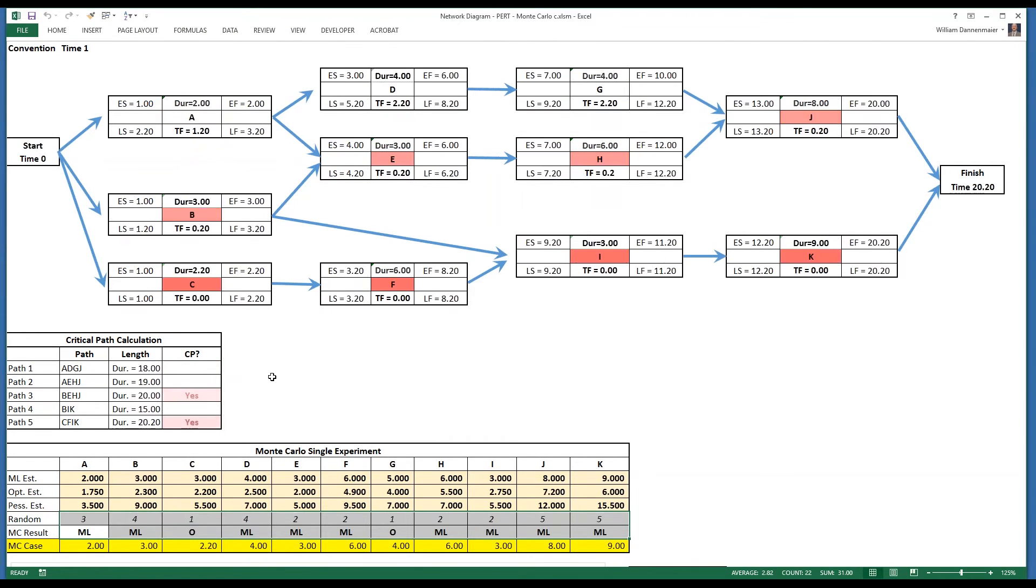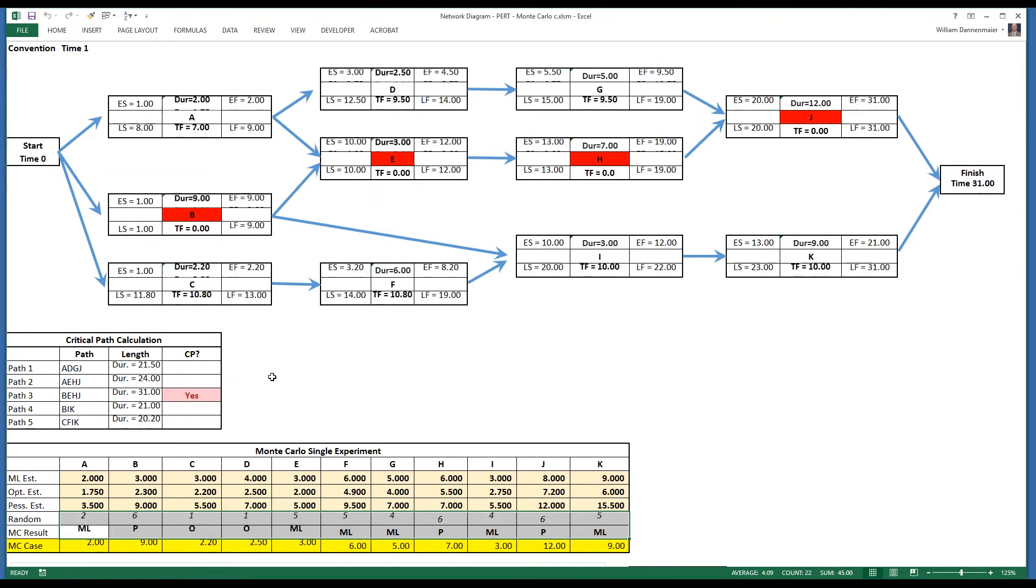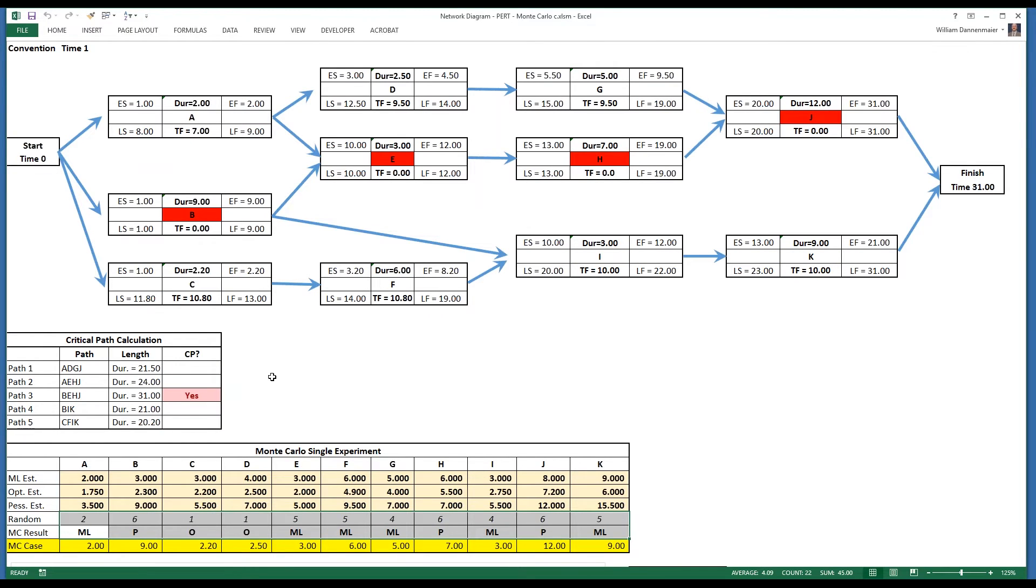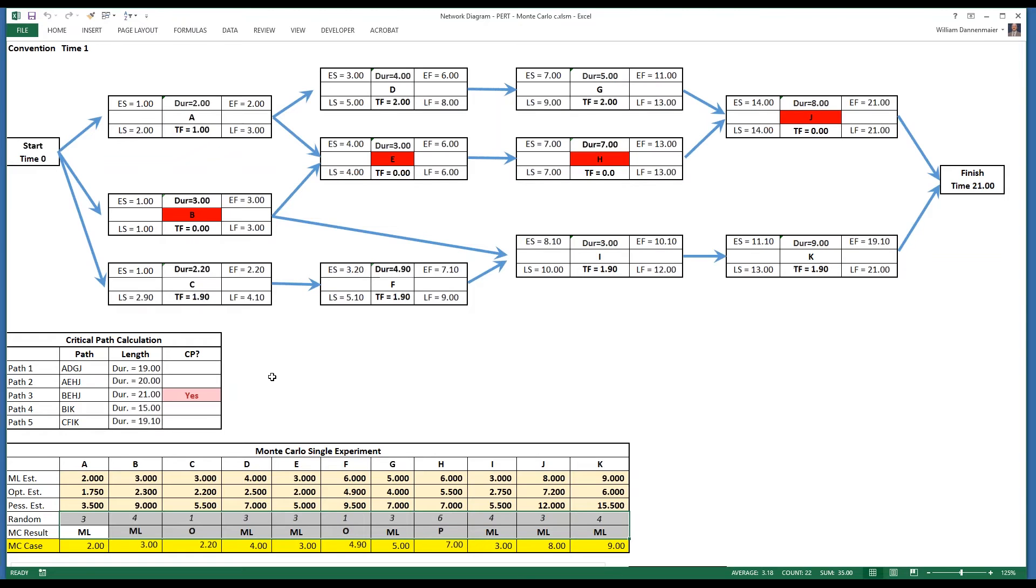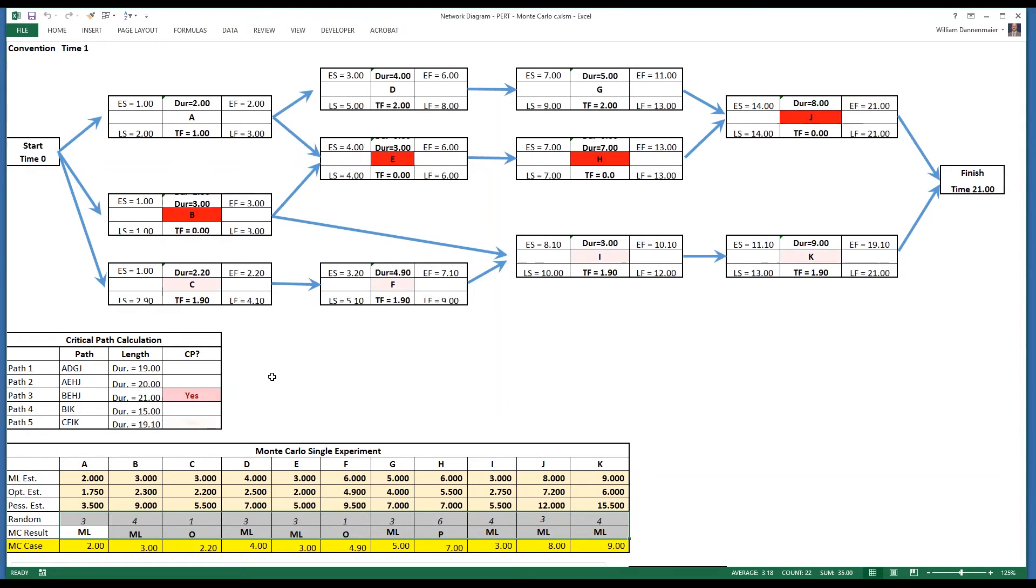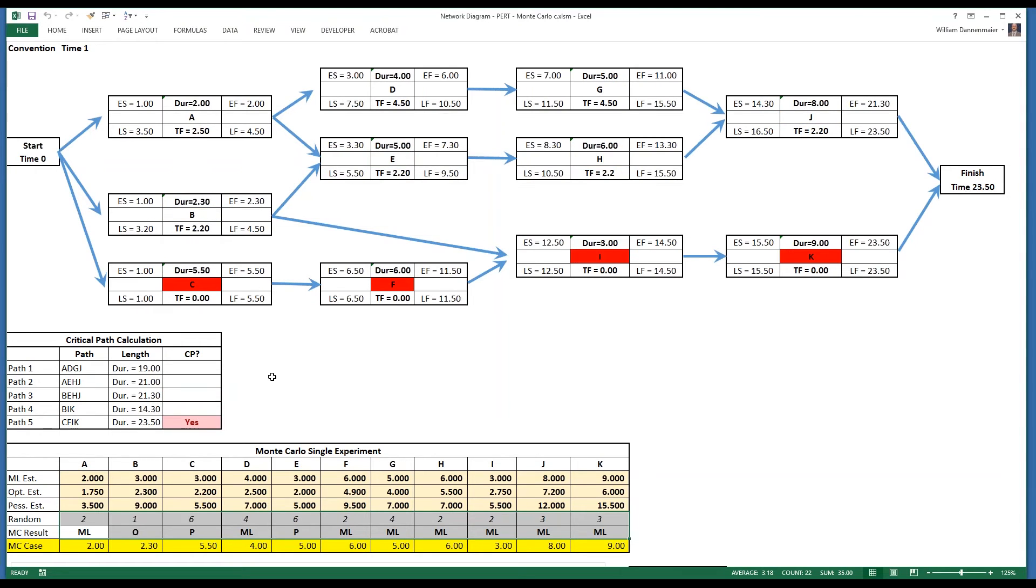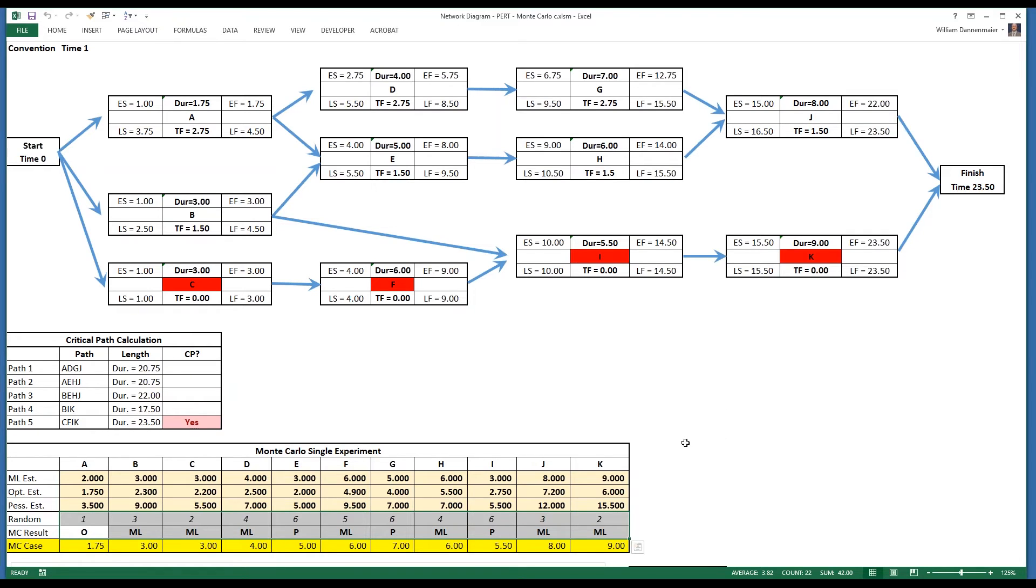Moving again, we notice that it will run through all of the various possibilities of optimism, pessimism, and most likelihood, resulting in changes in the critical path and in changes in the likely duration.